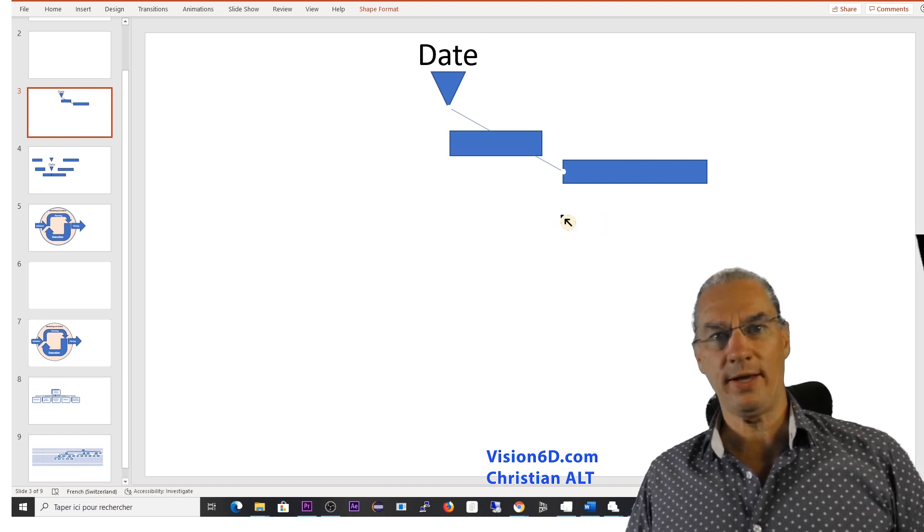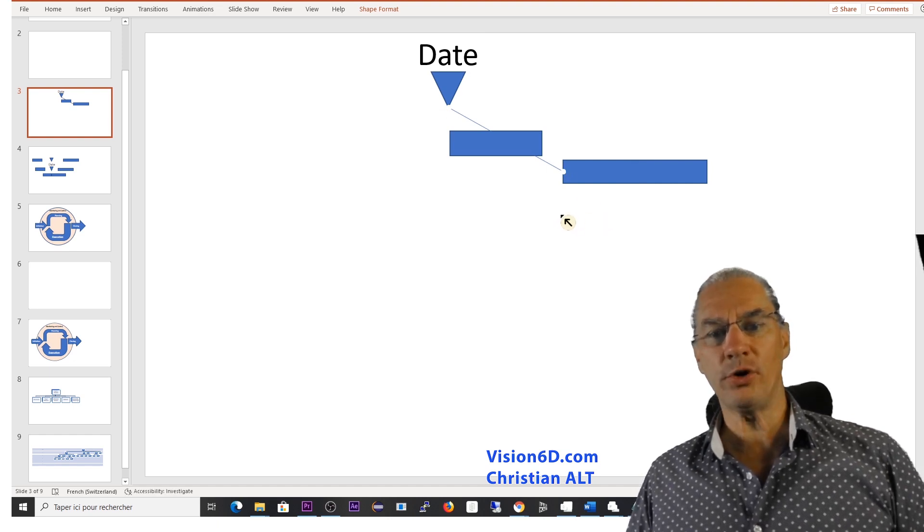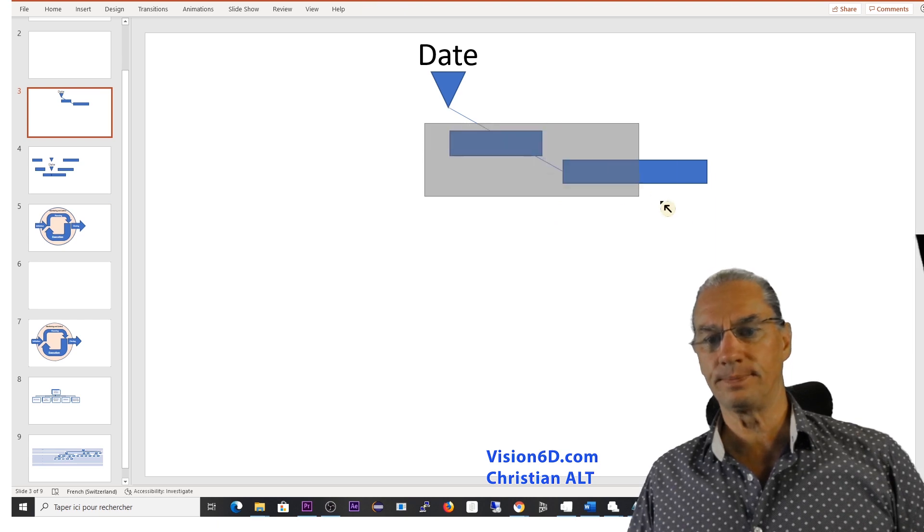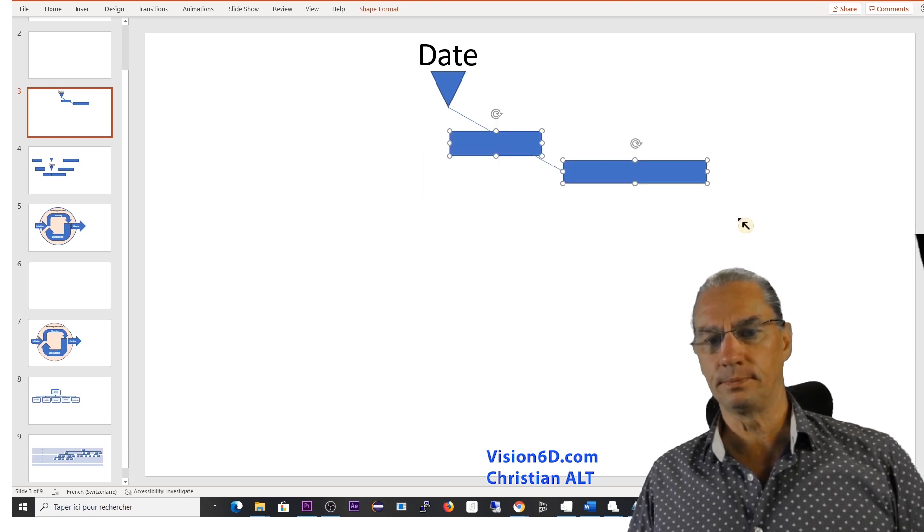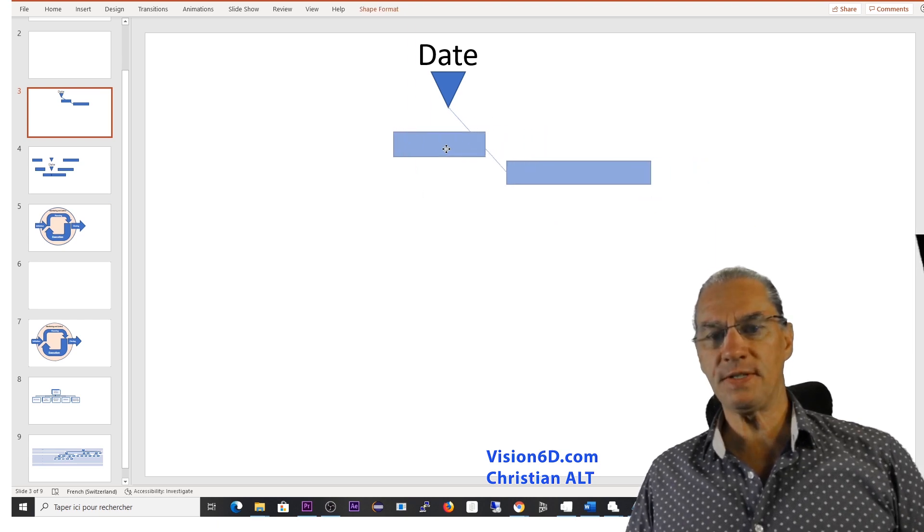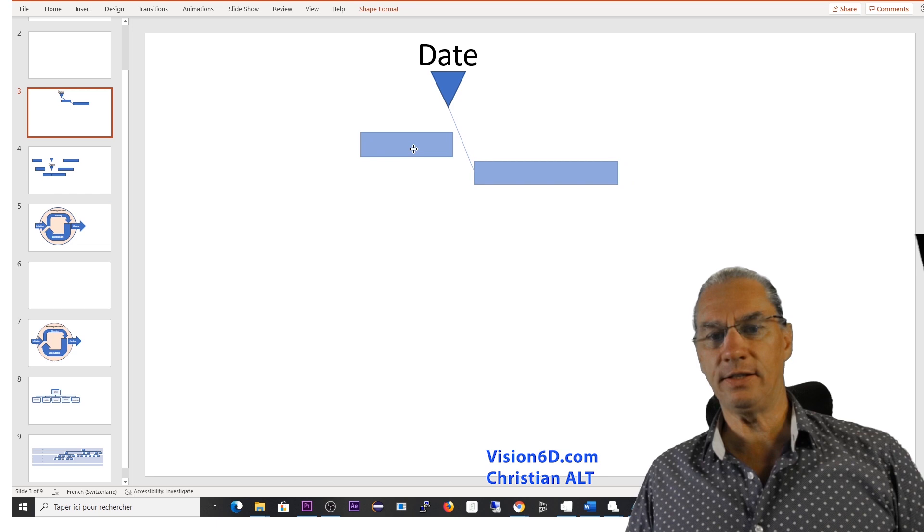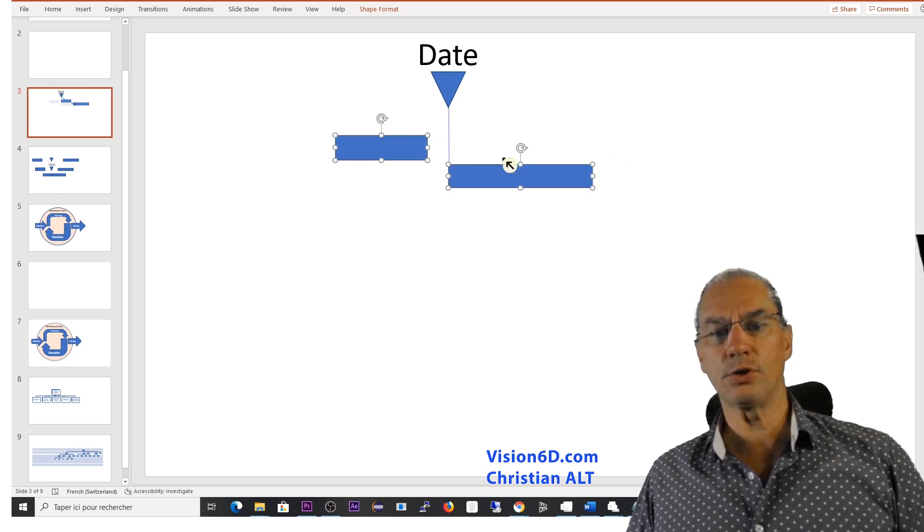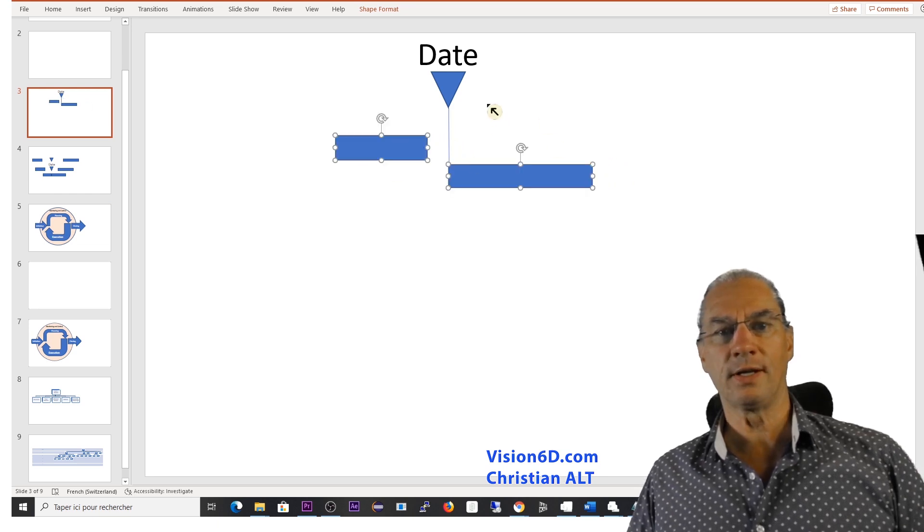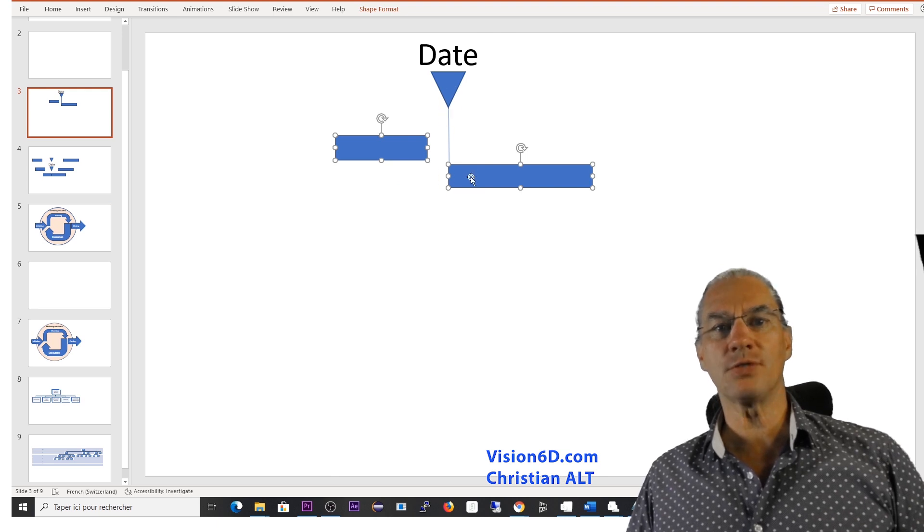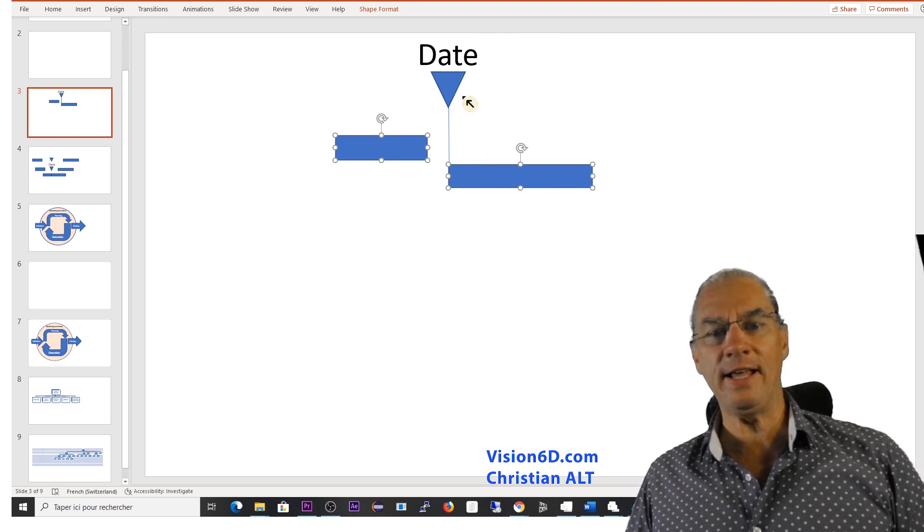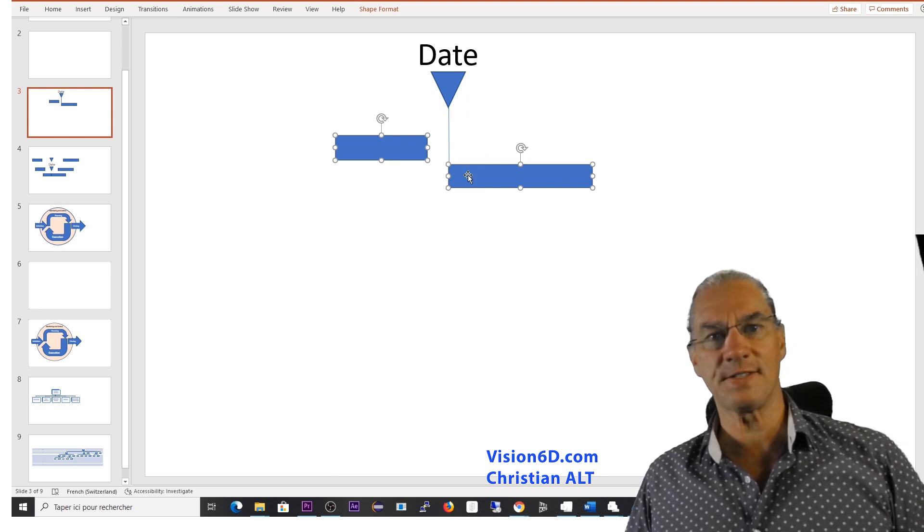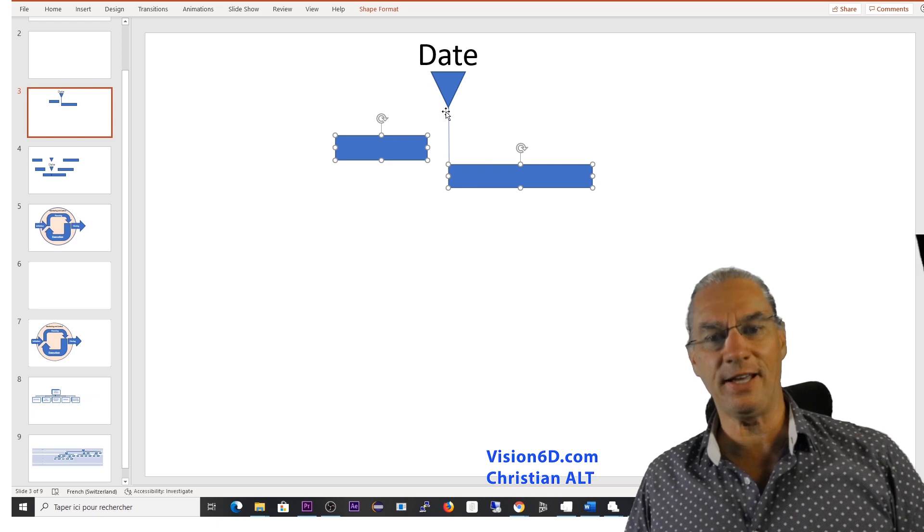What I need to do is to come and establish a link between the task and a date. In that way, when I'm going now to move it, we will see that the date is supposed to block. It's the constraint. So a constraint is really a link between a task and a date.